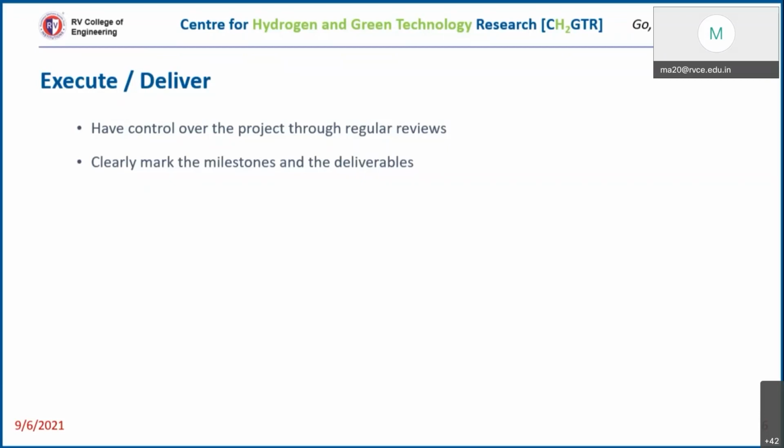So for that, you need to clearly define what is the milestone. So task 1 is a milestone, task 3 is a milestone, task 5 is a milestone. So at that point, you cross check and verify whether you have achieved. So how far are you, or how close are you to the objective or goal? So introspect and cross check the progress to avoid deviations.